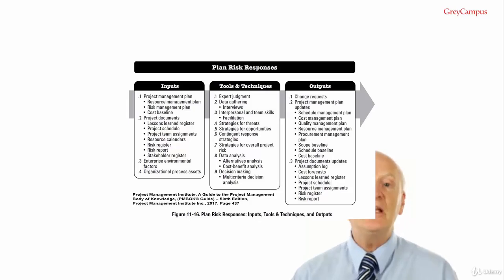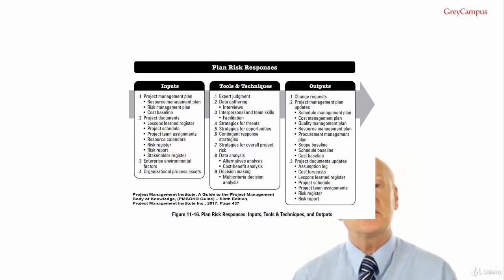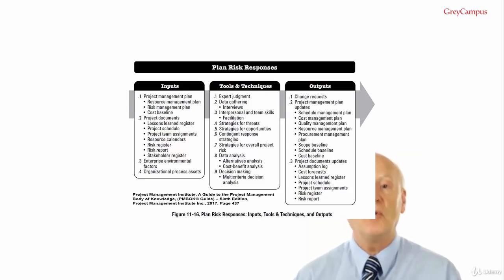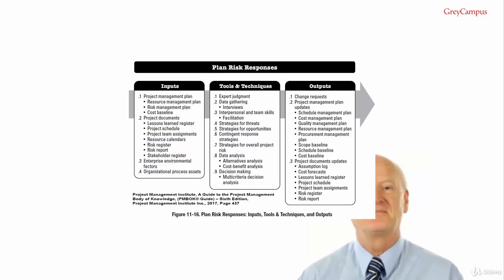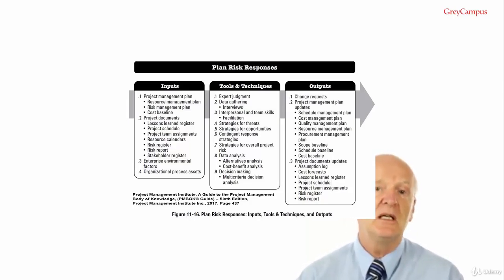Very important, if you apply this treatment and there's still a 0.0000001% chance of it happening, then you've not avoided it. The probability must be 0%. For example, your project is to build 3 explosives manufacturing plants in the United States, and they must be no further than 300 miles apart.